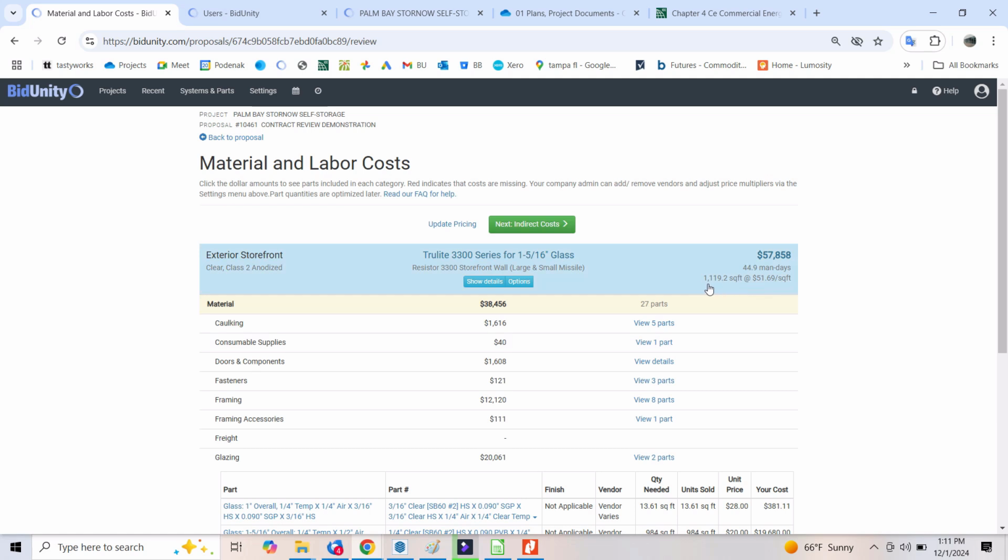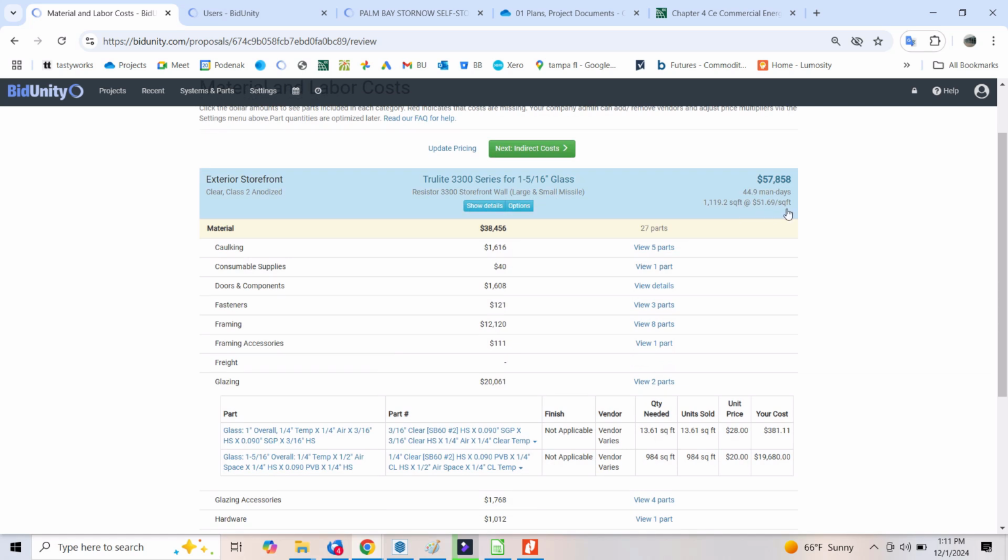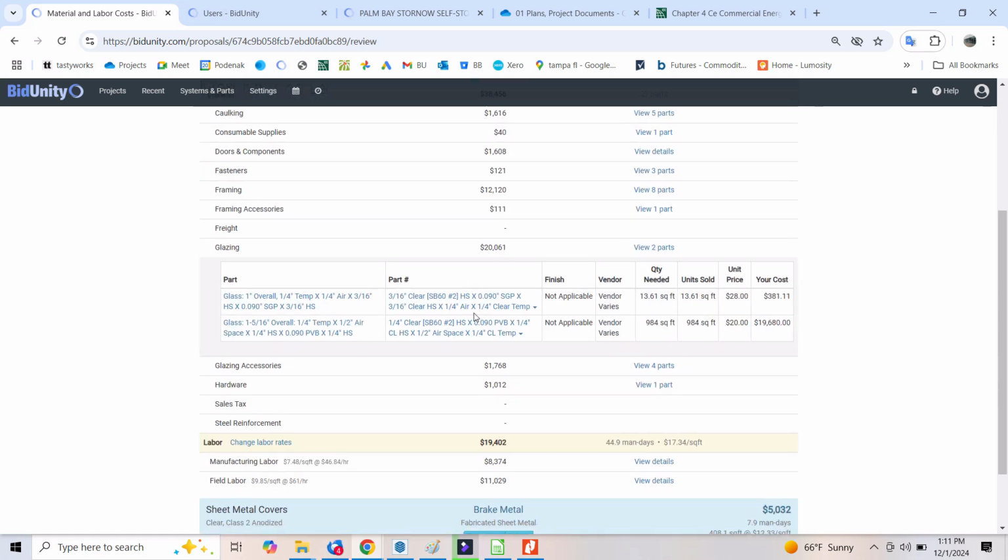The total area is 1,100, so that's maybe $2,000 of potential savings in the shop, and that only accounts for, you know, if I'm expecting we're going to be $5, that doesn't include fully the transportation of the material to the project site. So I'm comfortable at 17.